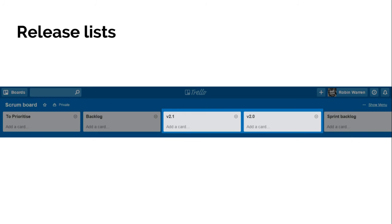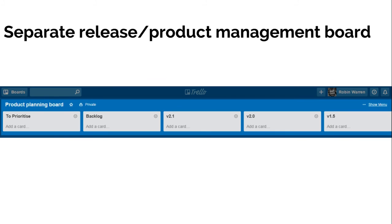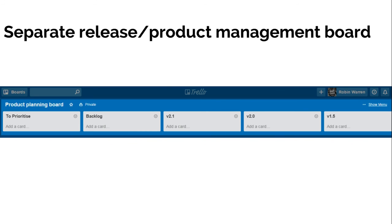The problem you have here is that we've already got four lists. If we had a notes list over on the left, suddenly we've got a lot of lists before we get to the ones where the work is actually happening. The majority of people using this board every day are obviously the team, and they're going to have to scroll over to the right to get to their lists. So the next thing to do is to create a separate board with all of this on for doing your release planning. Move your cards about there. Maybe have a list over on the right called Groomed, and as you pull cards out of the version 1.5 here into the Groomed list and say that they're ready for the team, you can then periodically send those cards over to the scrum board. There's an option in Trello to send an entire list to another board, or individual cards. It makes that very simple to just send things from one place to another.